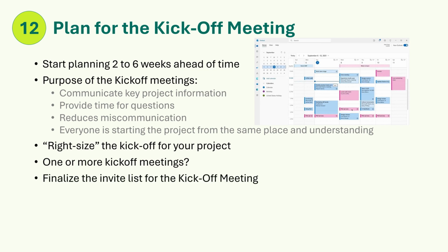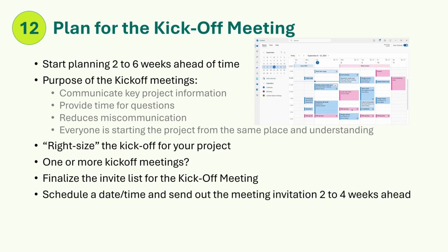Finalize the invite list for the kickoff meeting. Schedule a date, time, and duration. Suggest 25 minutes for a simple paver project and up to 2 hours for larger, more complicated projects. Make sure to save time for questions. If you plan to go over 2 hours, add a 10-minute break in the middle of the agenda. Note, it will be difficult to keep people engaged for more than 2 hours.